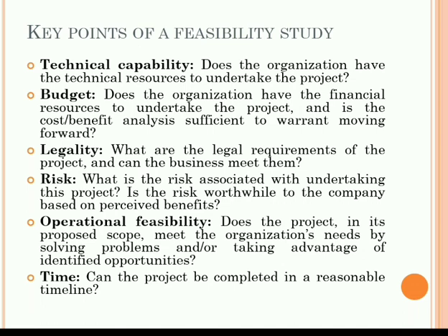This is done in the feasibility study. The potential risks to the project were considered along with public opinion and investment by the community. The return on investment was calculated and it was determined that the forecasted revenue exceeds the expected cost, leading the hospital administrators to approve the project.